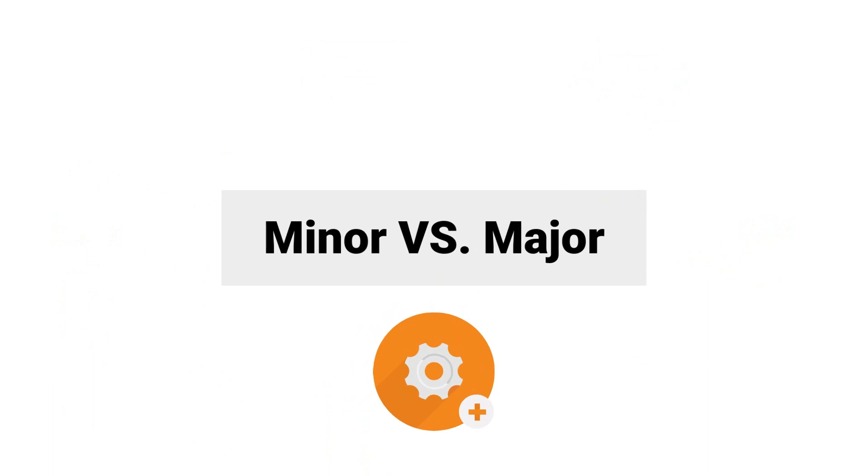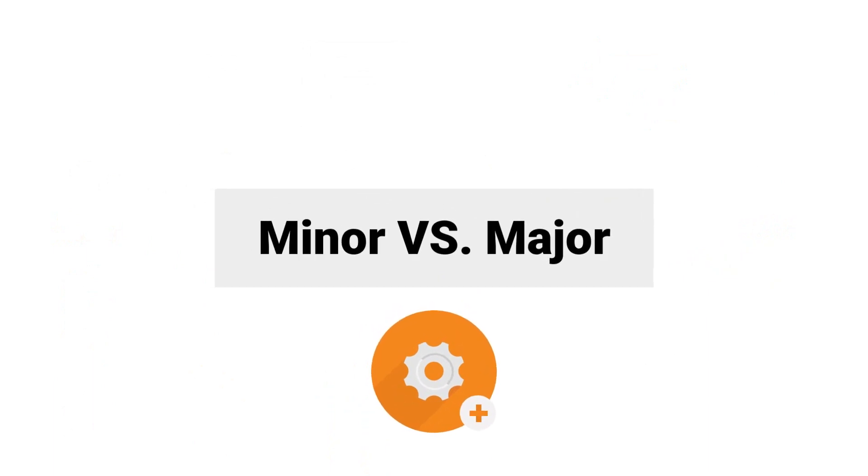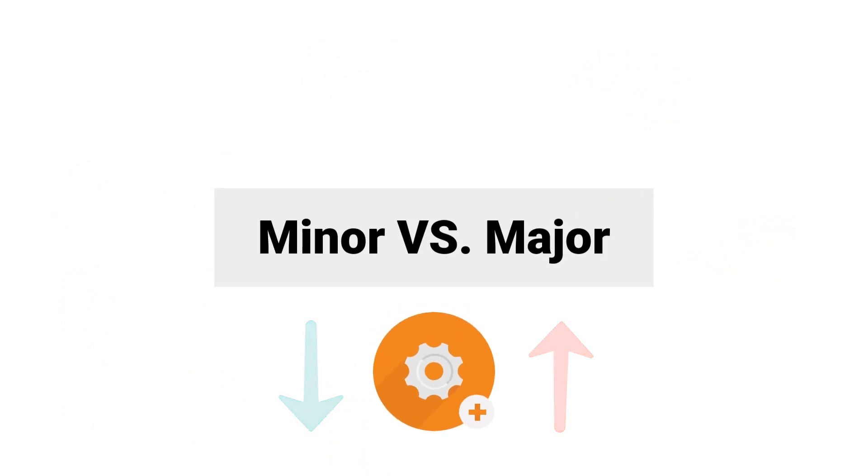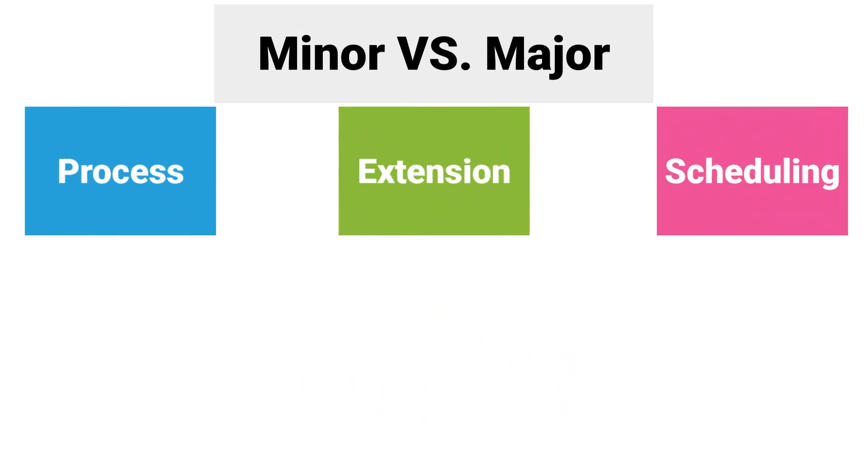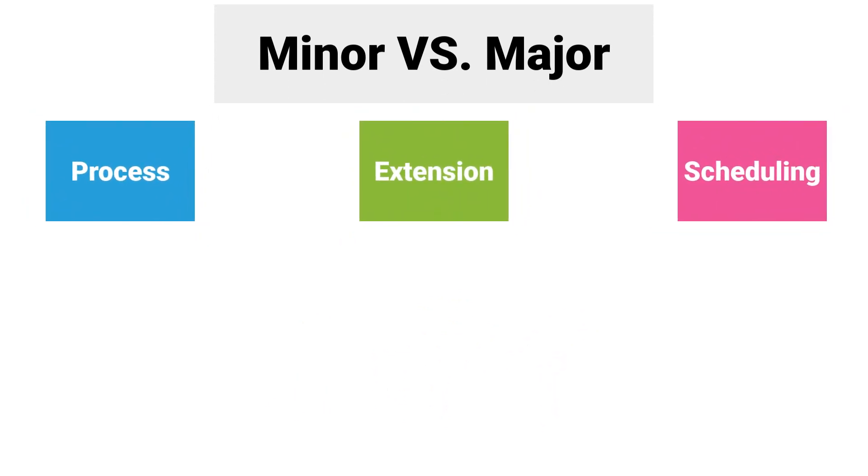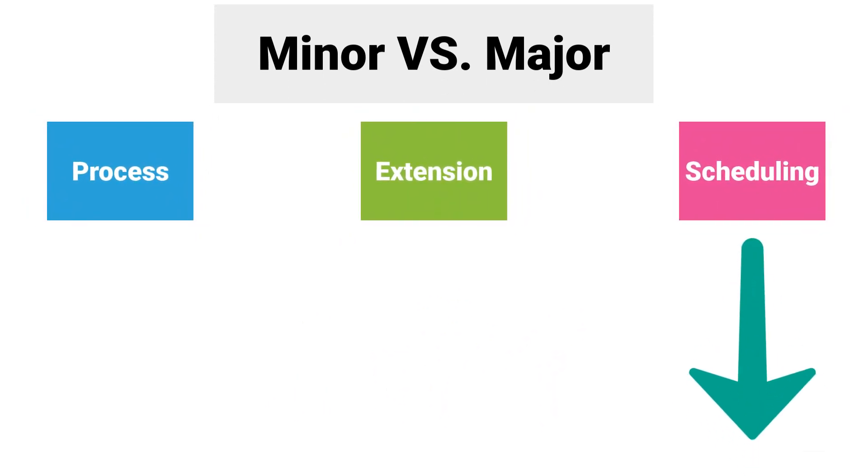Now I am going to show you how to decide whether the change request is minor or major. As already mentioned, there are three types of change requests. Scheduling is always minor change, therefore I will explain the other two types.